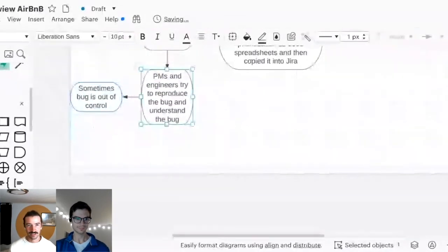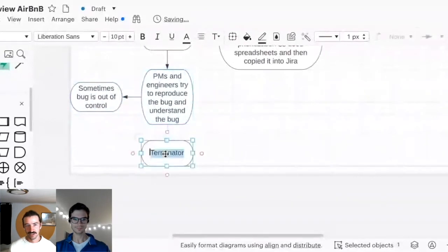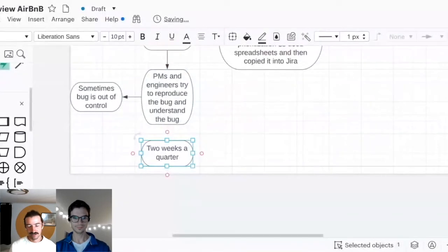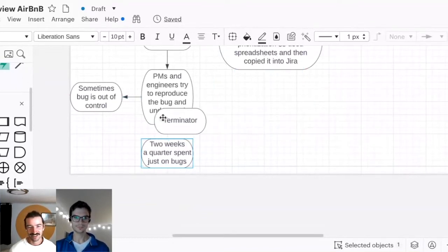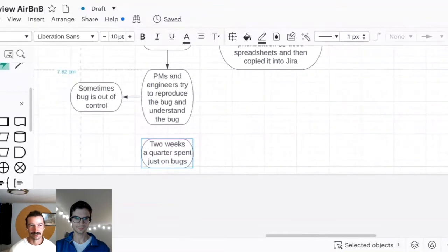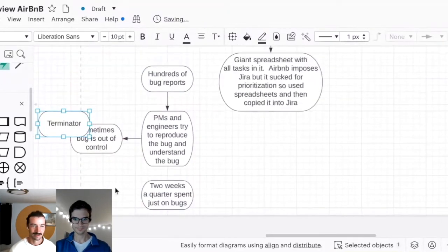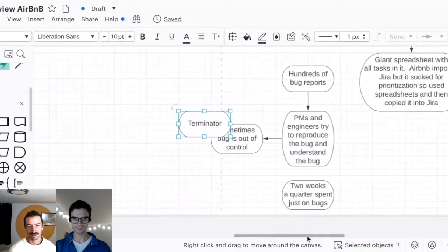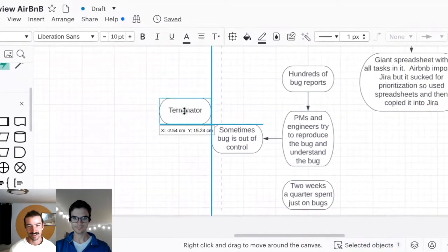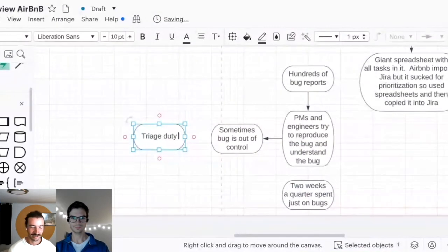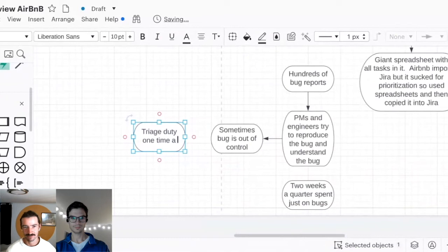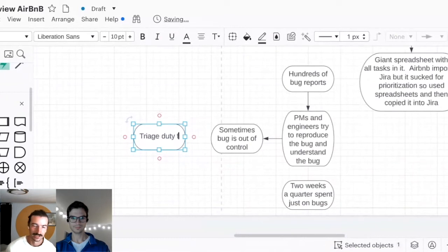And then we had a more complicated process around ensuring that bugs were triaged. Basically, you would do a week of triaging duty on an alternating schedule, and that week you had to triage every bug. Another thing to add to the complexity is that my team owns some payments pages, but other teams own other things. Some teams on the payments team don't own any user-facing things, but they own the backend systems. So a bug might get reported to my team because we own the checkout page, but in reality, it needs to be fixed by some other team. And just reassigning those is a lot of work as well.